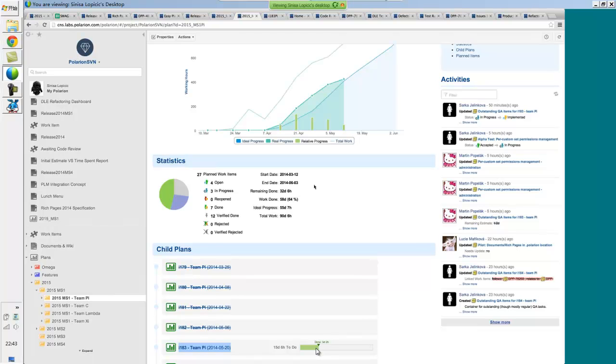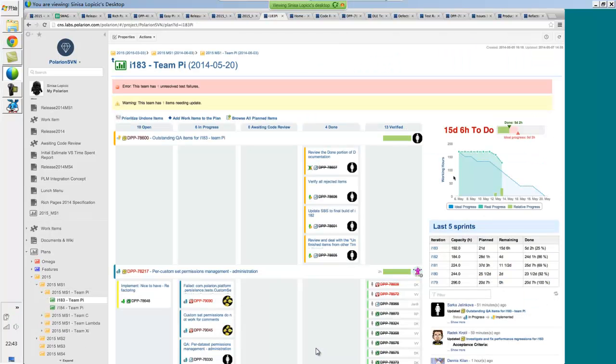So it's very common to see very flat starts at the beginning. This one's a bit more flat than you would expect on the other pages, and if you look at some previous sprints. And then as the sprint progresses, you would expect it to start coming down. The reason for the flat start usually is because there could be some leftovers from the previous sprints. It takes time to get it going. There might be some ongoing discussions around how to do something. So therefore, it does take a bit of time to actually get it going.